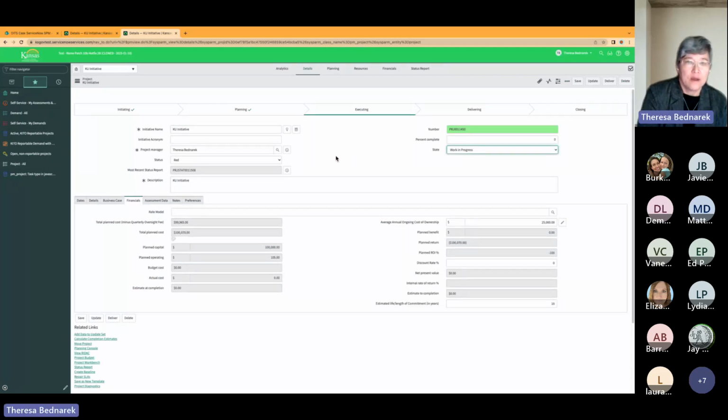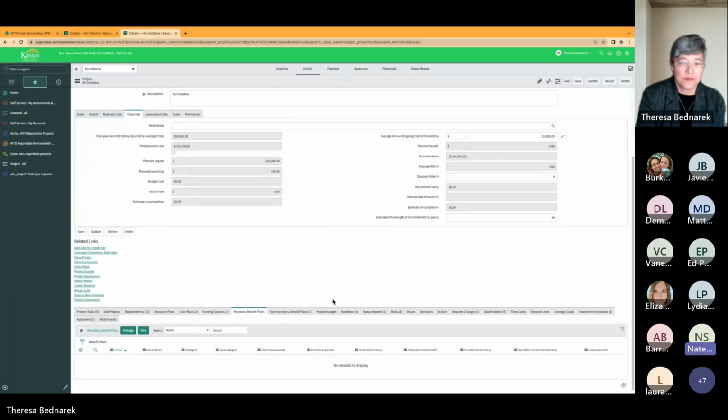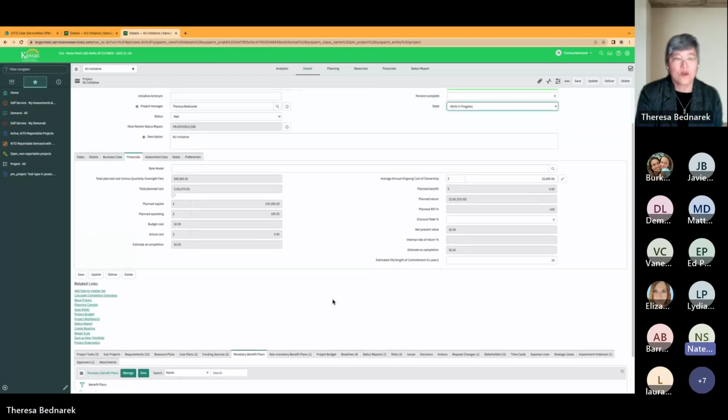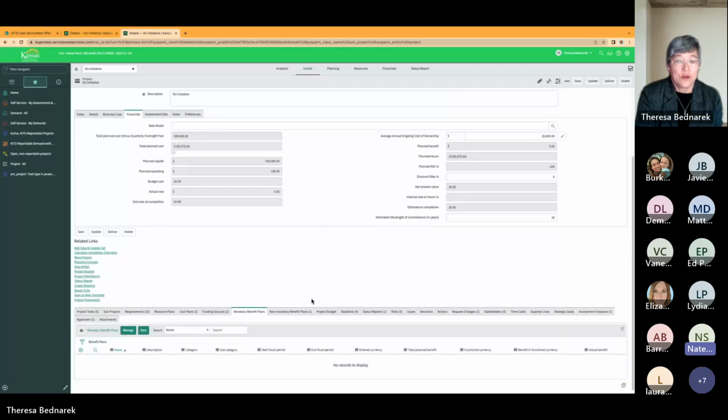I do have a quick question. We submit the recast request, and then that's approved, and then we go back and redo the schedule and cost and all of that. We don't have to have the schedule and cost as part of the request? Correct, you can recast and put that in later. That makes perfect sense.